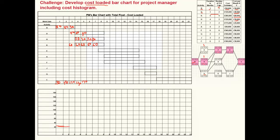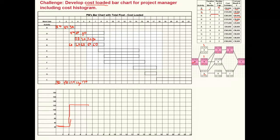The next step is to develop a cost histogram — starting at 30, 30, then a peak at 130, 130. Some contractors use a front-loading strategy to get earlier payment from clients, but this is not looked upon positively and could create mistrust. Costs must be proportionate to the work being accomplished on site. This is how we develop cost-loaded bar charts and cost-loaded histograms.